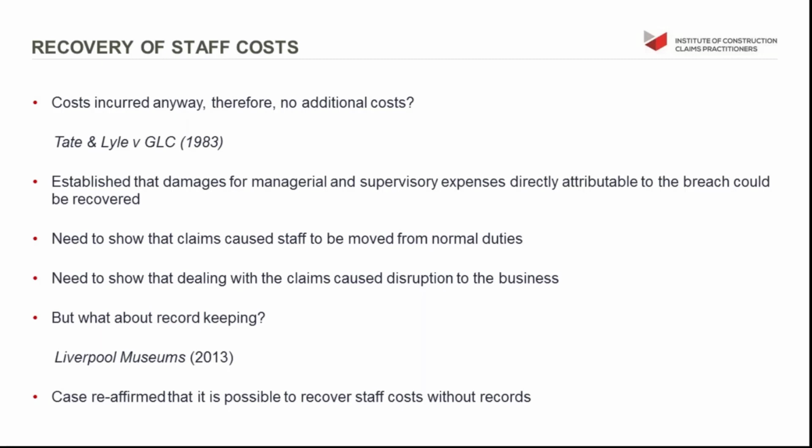So whilst I wouldn't recommend you rely upon that, and I would say it's much better to keep adequate records, it is entirely possible with the Liverpool Museums case and subsequent reaffirmations to recover your costs of claim preparation in those circumstances where the contract administrator or engineer hasn't carried out their obligations in accordance with the contract, even if you don't have the records.